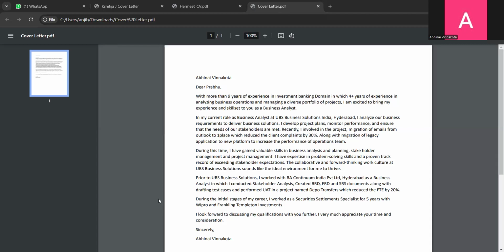We will make sure that this feature is moved back to the product backlog, and we'll try to pick another backlog item before closing the sprint. And we should not waste the time. Not every time, sometimes only it happens. Not every time we have that feasibility to pick if there is a dependency. If there is a delay due to dependency from other teams, we do that.